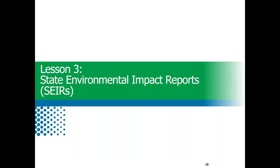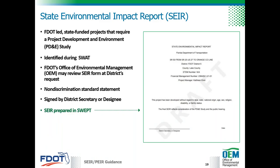Now we'll delve into the process of preparing State Environmental Impact Reports in Lesson 3. State funded FDOT PD&E studies are documented in a SEER. The SEER documents the social, economic, cultural, natural, and physical issues or resources evaluated as part of the project. Depending on the impact to environmental resources, SEERs may be prepared at the level of a Type 2 categorical exclusion, an environmental assessment, or an environmental impact statement. All SEERs are now prepared using a form in SWEPT.